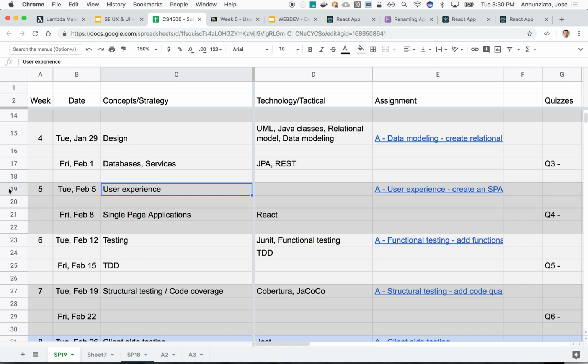Also, you should be able to edit the filter for the Scrum board, and please add your team members to that particular team's Scrum board, so that from now on, most of your work will be within that Scrum board to see who's in what current state, and what the stories are as the sprint progresses.